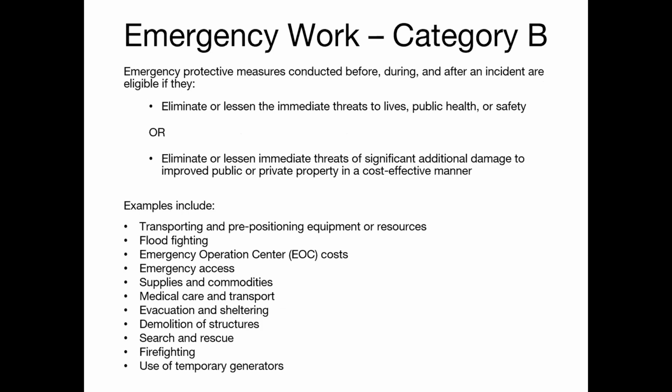Category B is for emergency protective measures, such as search and rescue activities, sandbagging, etc. The deadline to complete Cat B emergency work is 6 months from the declaration date, unless a time extension has been granted.